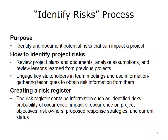We will now begin to break down the risk management process. During the identify risks process, you will pinpoint and document all project risks that may impact a project. While you began doing this at project initiation, remember that it is an iterative process – you will continue to identify risks throughout the project lifecycle. First, you should gather and review all project information to determine the sources of risks and to identify those that may arise. These documents include the risk management plan, information about schedule, costs and quality, activity cost and timeline estimates, scope baseline, and the stakeholder register. Part of this information gathering process includes meeting with stakeholders to review risk information with them. They may be privy to information that you don't know and that they don't think is important, but which impacts the project.